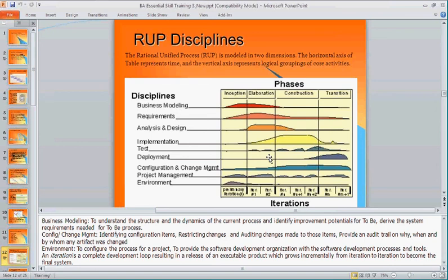If they feel that, wait a minute, because of this design, our requirements need to be changed, right? Then that change must be documented. We go into another iteration. Yes or no? So we will go into another iteration, document the change, do the version number. We will revise all of our models, the requirements, because of the way the software was designed.